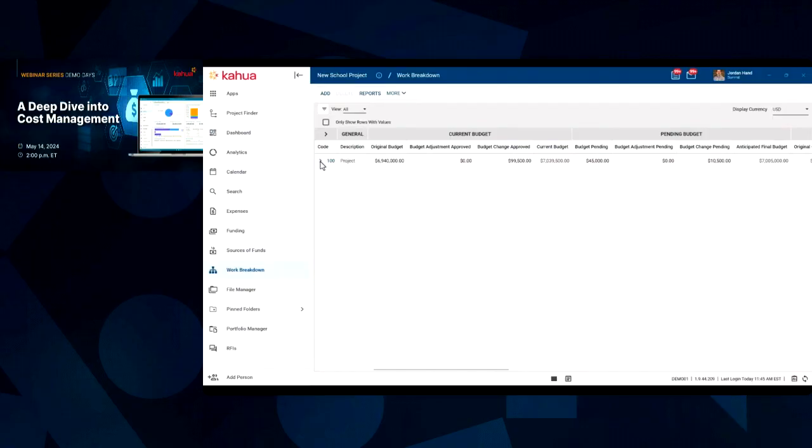It's really a critical backbone component of our system. This is where you establish your cost codes for the projects, and once they're established, you'll be able to leverage those cost codes in various apps like contracts or change orders, basically documents or records in the system that reference these line items and help maintain a single, not general ledger, a ledger of all your project costs.